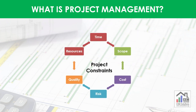Project constraints are interrelated to each other. For example, if you want to reduce the time of a project, then you may have to increase resources, which will in turn increase the cost of the project. And if you cannot increase your budget, then you may have to compromise on scope or quality. This nature of constraints makes project management extremely important for projects.